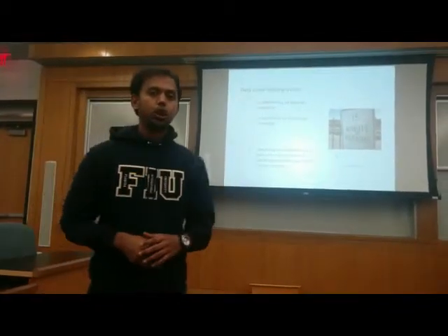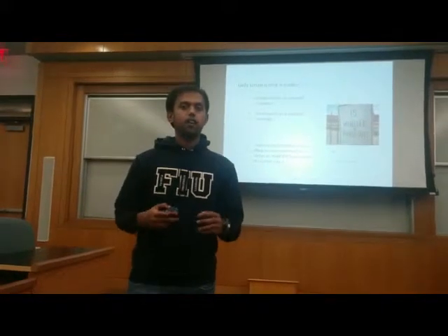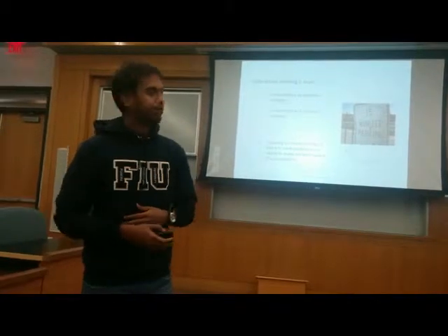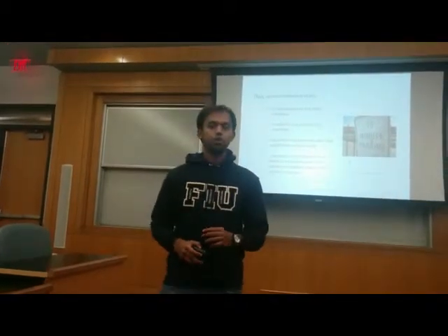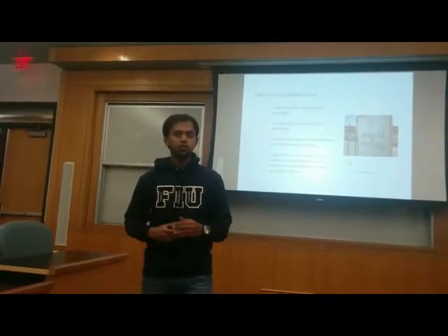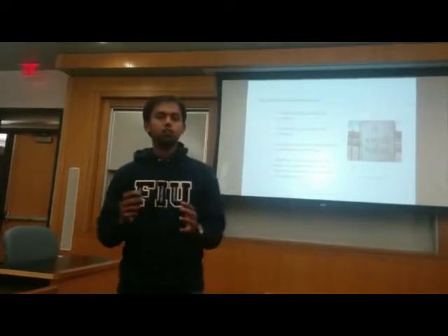Daily Scrum meetings are referred to as stand-up meetings. Stand-up meetings reinforce that the meetings are going to be short and precise. Generally, the duration of the Scrum meeting is going to be anywhere between 5 to 15 minutes. It's the responsibility of the Scrum Master to make sure that the meeting is not more than 15 minutes.